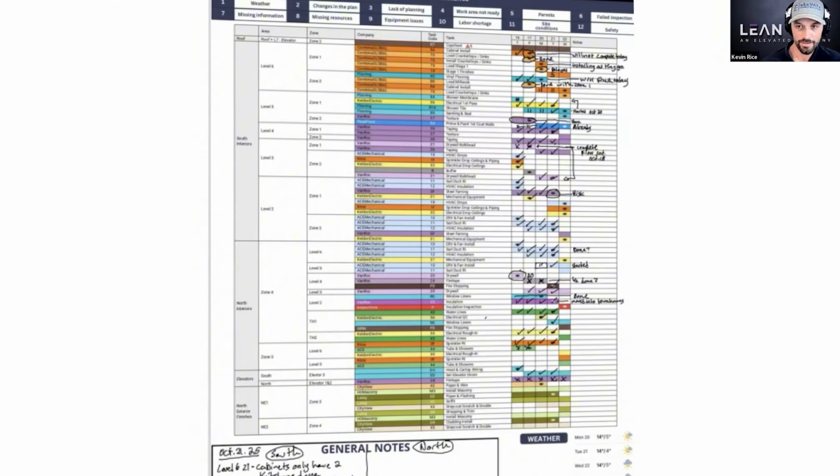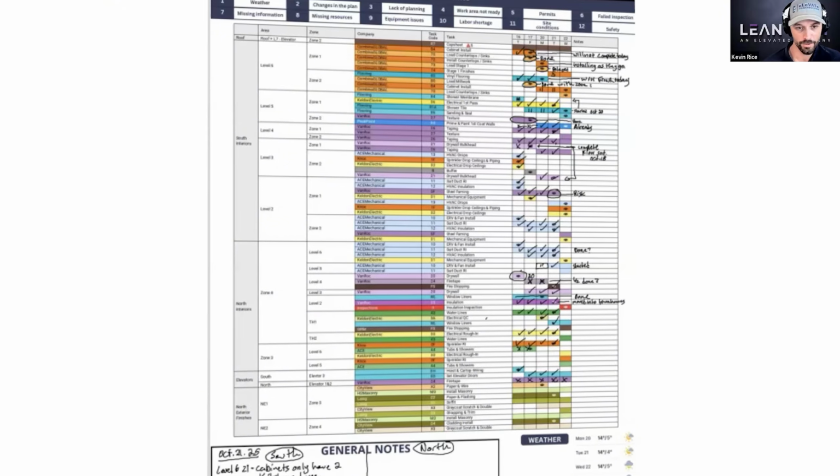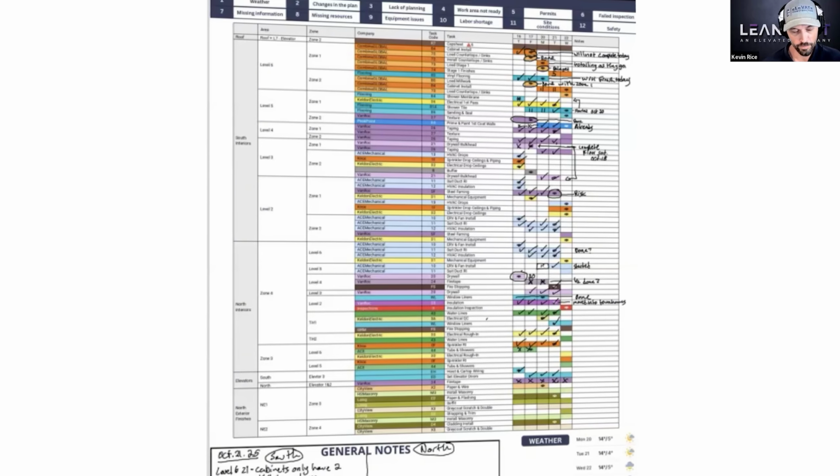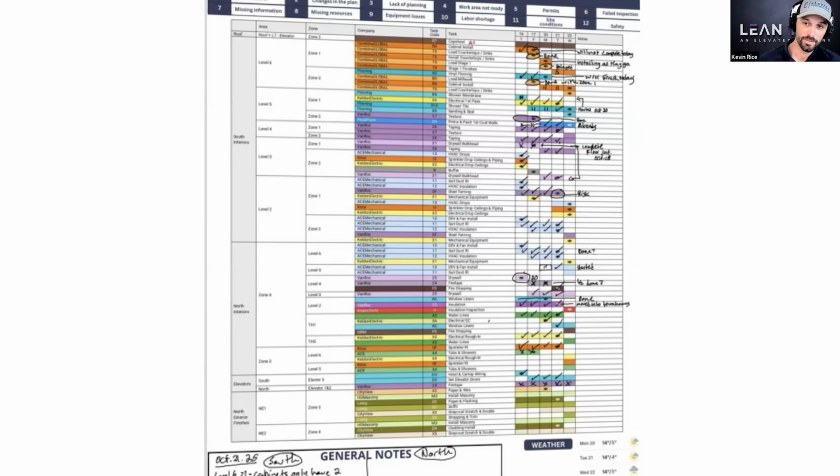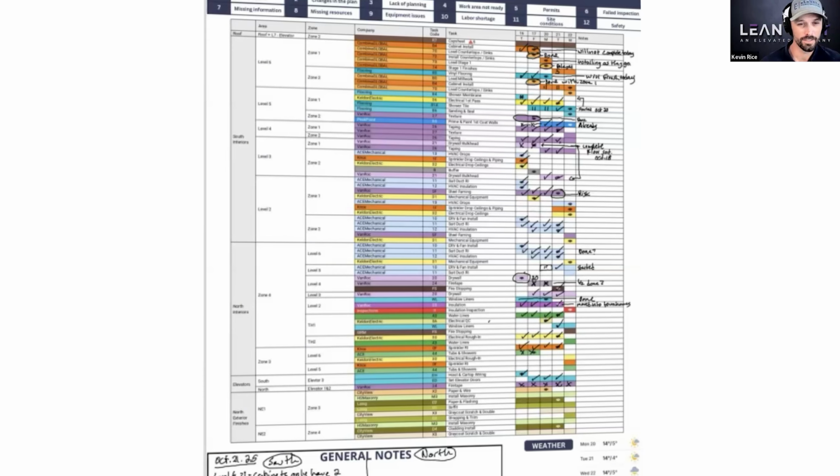And the changes that are happening with the weekly work plan, the look ahead, all the short interval plans, as well as the entire production plan, have been remarkable. So they are really doing a good job at getting this project on track. They were late. They had pushed substantial completion twice, and they were not able to push substantial completion anymore. And Tanner has actually brought this project in where we have, I think it's 15 buffer days now, due to his alignment on everything that he's using here.